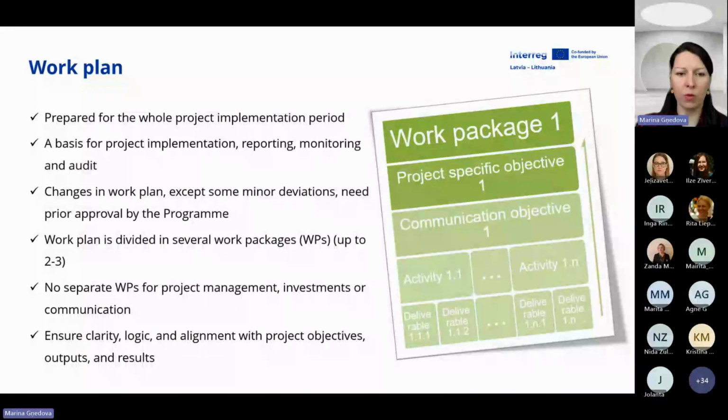Please, again, follow our recommendations and rules of the program manual. Please don't make separate work packages for project management, investments, or communication. Those who participated in the 14-20 period, you remember that we had such work packages before, but now in the new system in GEMS, there is no need to create separate work packages. This was one of the observations from the first call projects, that part of the projects still create these work packages separately.